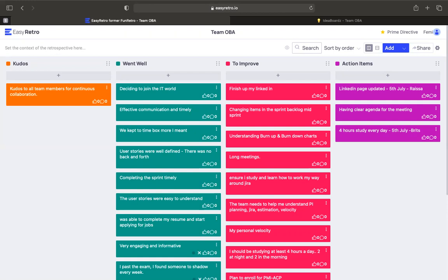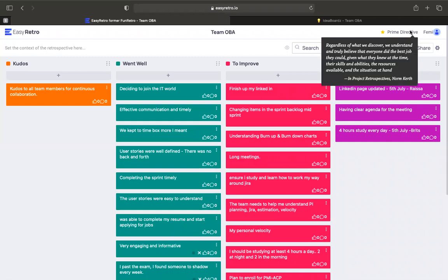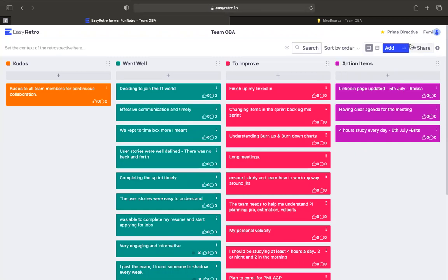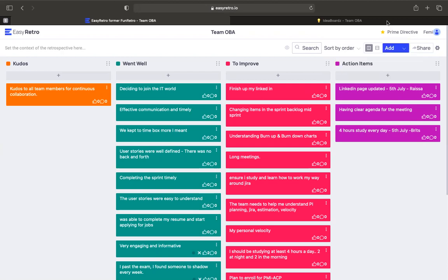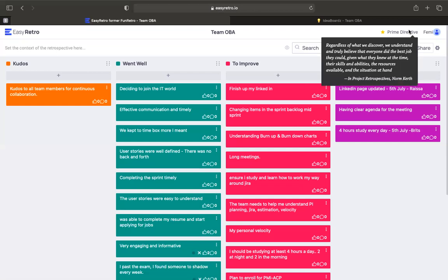So I implore you, because we want to be Scrum Masters and Agile leaders. Sometimes when I facilitate retrospectives on my team, I just want it to end. But the way to conduct great retrospectives is by having, before the main contribution, like we did today with a trivia. Sometimes you just tell people to talk about one thing that went well at home, or something that didn't go so well at home. You have that icebreaker right before you go through these columns one by one, right?